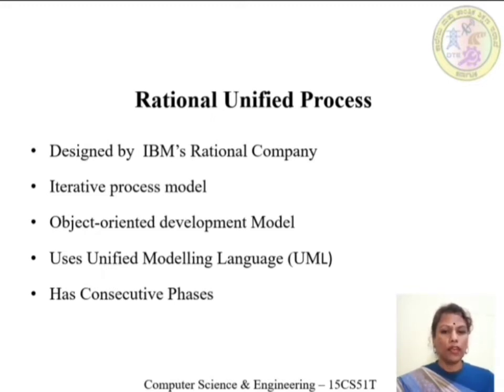This RUP is an iterative process model. That means it follows the incremental development approach. That means here the product is delivered to the customer in increments. In the first increment, some features are added to the product and that product is delivered to the customer. Feedbacks are collected from the customer and then these feedbacks are used to design and develop the second increment.